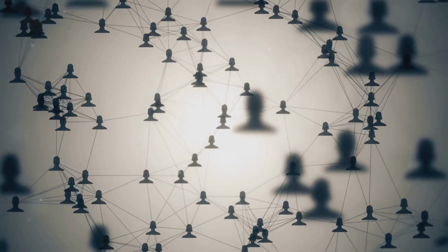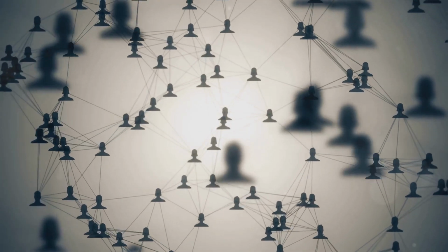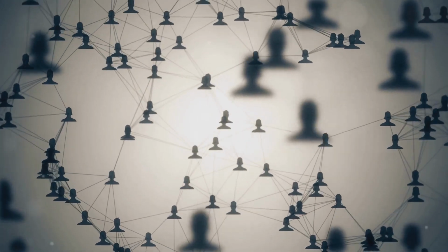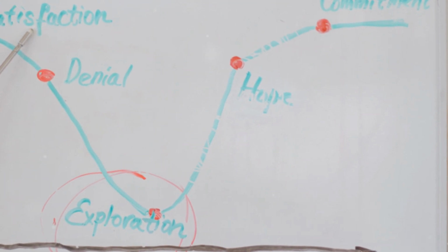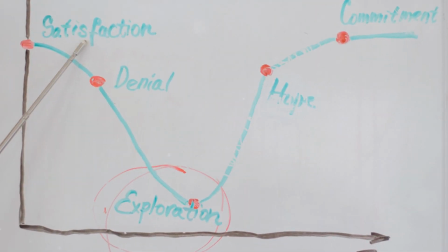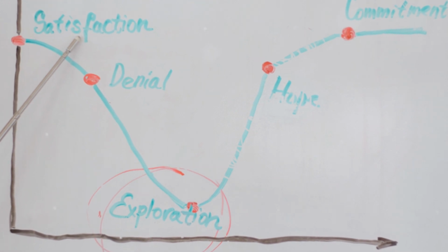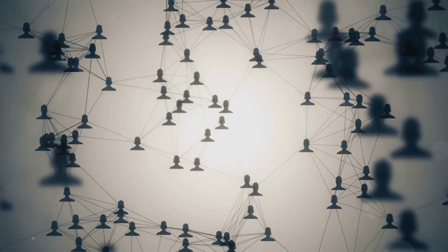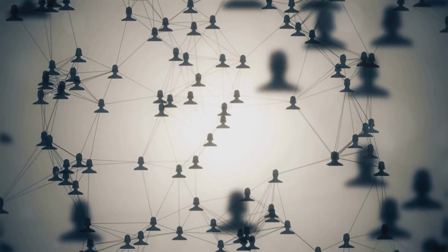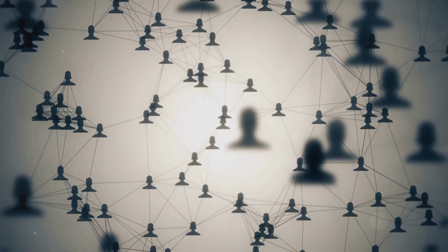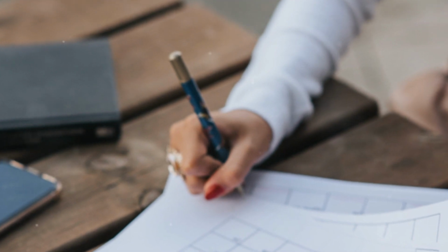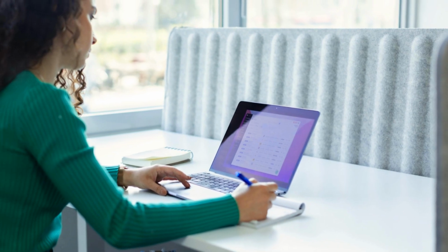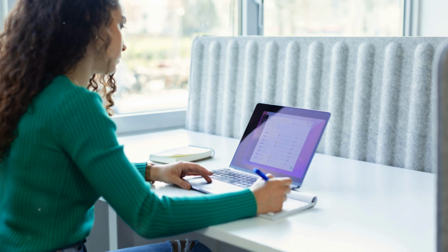In complex projects, activities often have multiple predecessors, creating intricate dependencies. When an activity has multiple predecessors, its ES is determined by the latest EF among them. This ensures an activity does not start until all preceding tasks are completed. Consider activity D with 3 predecessors, A, B, and C, with EFs of day 6, day 9, and day 11. The ES of activity D would be day 11. This illustrates how multiple predecessors can influence an activity's ES.